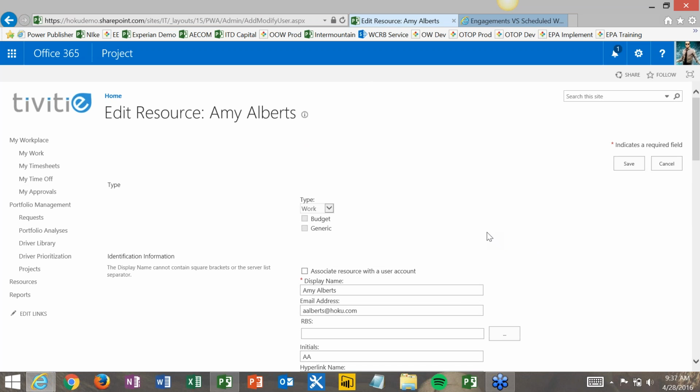So, using all of those different options with holidays, their work hours, how much they're available, it's going to look at the number of days per month, how many hours you're available each day, and calculate it all up so you can see per this month or per this quarter, how available that person is. But then once you start getting requested for different projects and that's approved, it's going to take away from that availability across all of your projects, right? It's looking at everything that you're working on and figuring out how much you have left. Okay, next question.